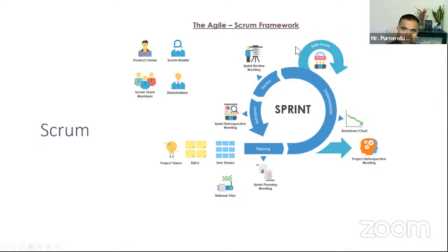And that's where you see one piece of work over here, which is daily Scrum. So daily Scrum is nothing but a casual chat. Meet at one place and say 3 things. What did you do yesterday? What am I doing today? And are there any roadblockers for me? So 3 major things get discussed. So it's just like a tea, coffee chat, right? But it's with an objective. It's with an objective of what we are trying to achieve as part of this sprint. Okay. So that's what the Scrum framework is. This is how you do it.